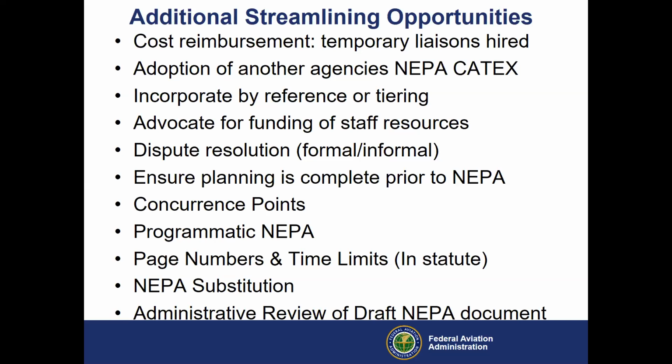Last bullet, I like these. I've been talking recently about it with a number of projects: administrative reviews of draft NEPA documents. So before we put the NEPA document on the street, whether that's an EA or EIS for public review, we would have the agencies review it and give hopefully their blessing, maybe not final blessing, but pretty close to final blessing, before it goes out for public review, just to iron out any kinks the agencies may see. Hopefully that helps them save a little time there.